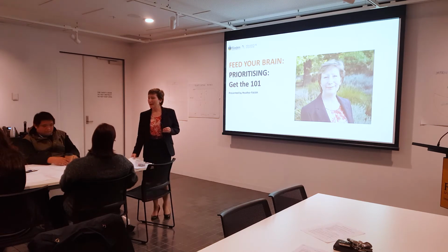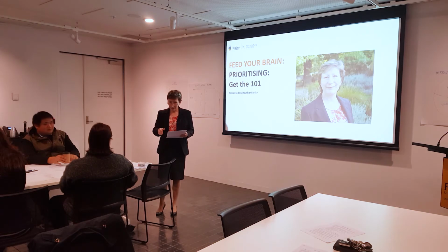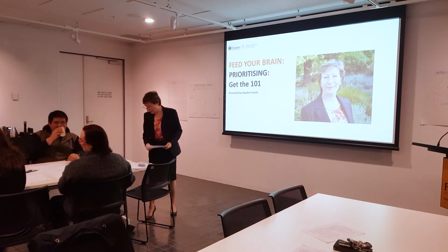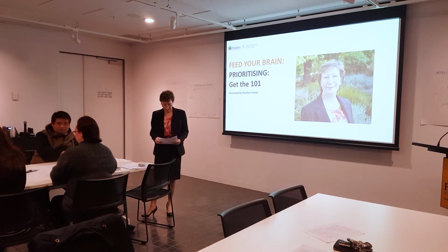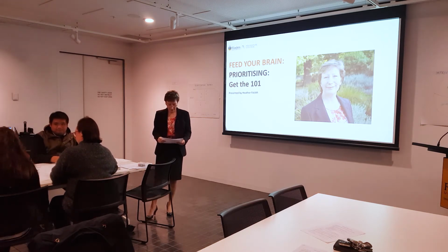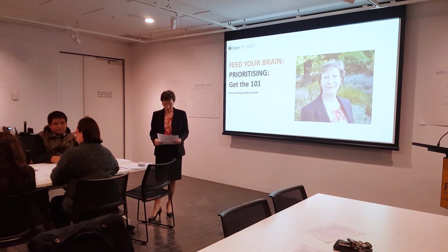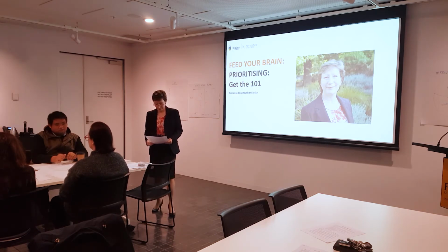Can anyone see themselves using this technique? So I'm sorry, I've forgotten your name. Austin. Austin, you said you're using this at the moment. Can you just describe how you're using it in your business? Yeah, so one of the large projects that I manage is essentially blue sky, so it's top right, but then within the project you have mini tasks and you put the quick wins throughout the project and really challenge people if they're working on your bottom right, because they're spinning their wheels for no reason.